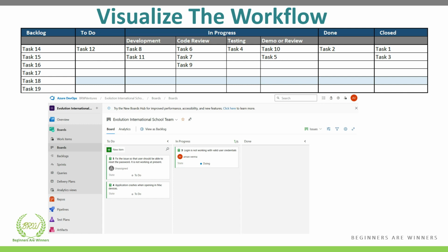That's how, when a particular development item is complete, they might move it to code review. Some subject matter expert, for example, a technical architect or team lead, or maybe some other person from the team, can review the code. And once they approve the code, the developers or the code reviewer can move the item to testing, wherein the quality assurance team will validate the item as per acceptance criteria and as per the requirements which have been defined.